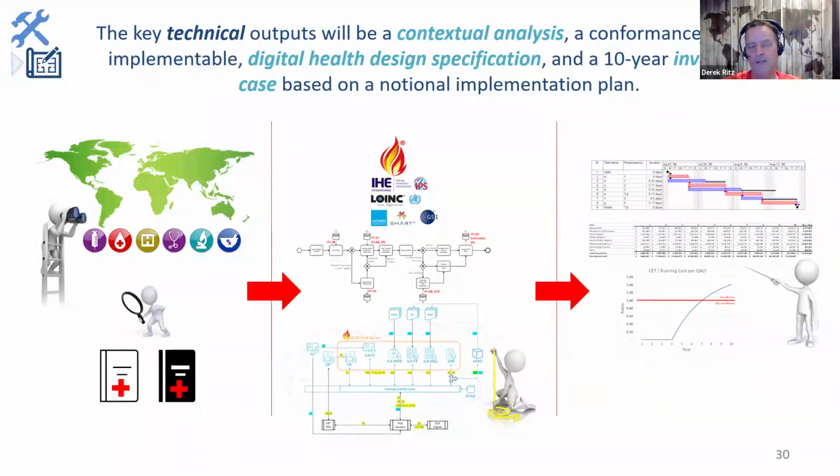If we make any changes to these standards, we're the ones who own that. And I was advising them, and I said, I can tell you, we don't need to do that. But if you think we have to do that, just so you know, that means somebody on this call should put up their hand and say they're going to babysit this specification.